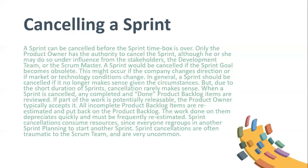Cancelling a sprint: a sprint can be cancelled before the sprint time box is over. Only the product owner has the authority to cancel the sprint, although he or she may do so under influence from the stakeholders, the development team, or the Scrum Master. A sprint would be cancelled if the sprint goal becomes obsolete — this might occur if the company changes direction or if market or technology conditions change. In general, a sprint should be cancelled if it no longer makes sense given the circumstances.